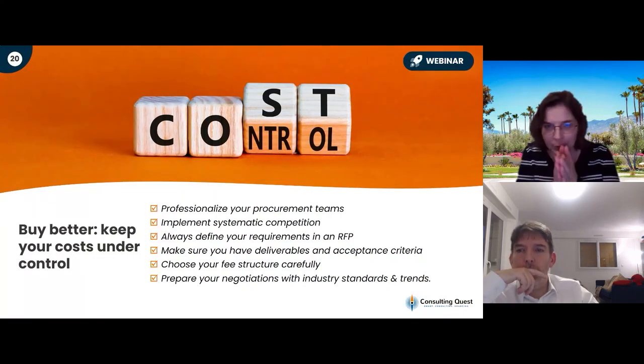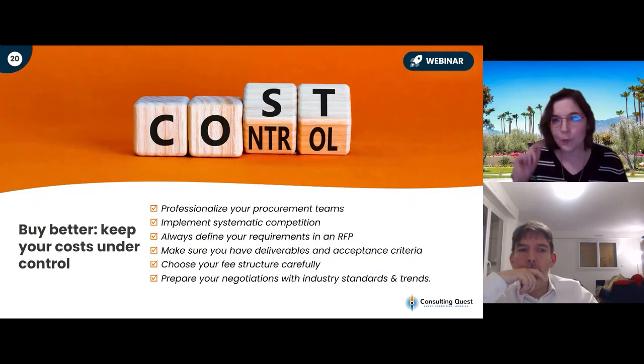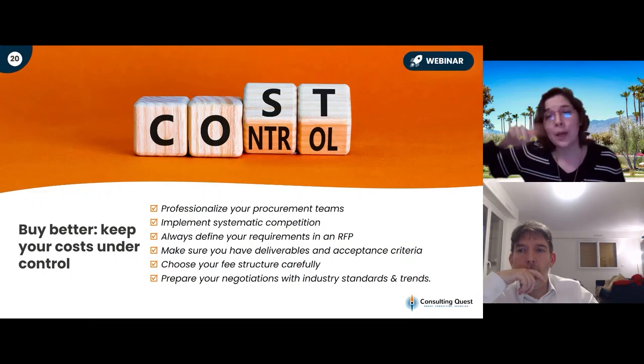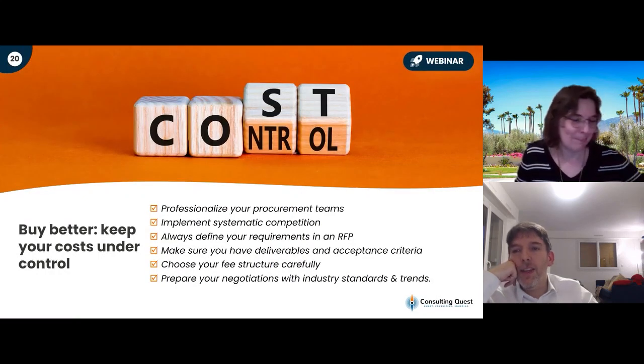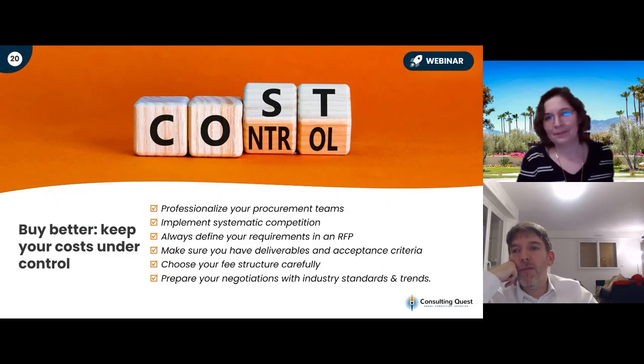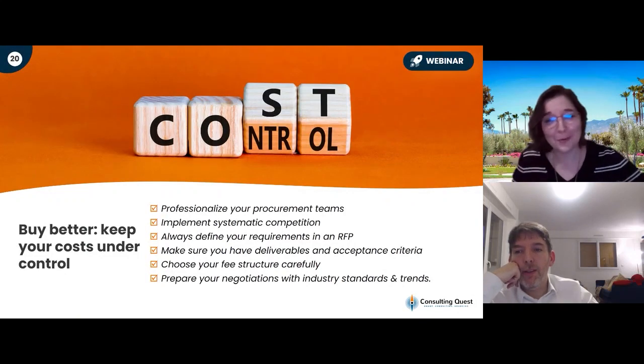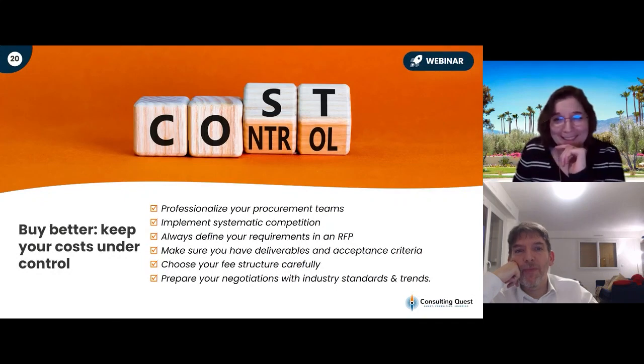So that's very important. If you decide on a specific fee structure, then you have to follow up. You have to make sure that until the end of the project, you implement and you manage it as it should be. But if I had just one guidance to give, we stay away as much as possible from pay-as-you-go. Agree on a flat rate for a given set of deliverables and then manage the changes. Pay-as-you-go is the legal model. It doesn't really fit the consulting one. Even in legal, we don't always agree with things like that, right?